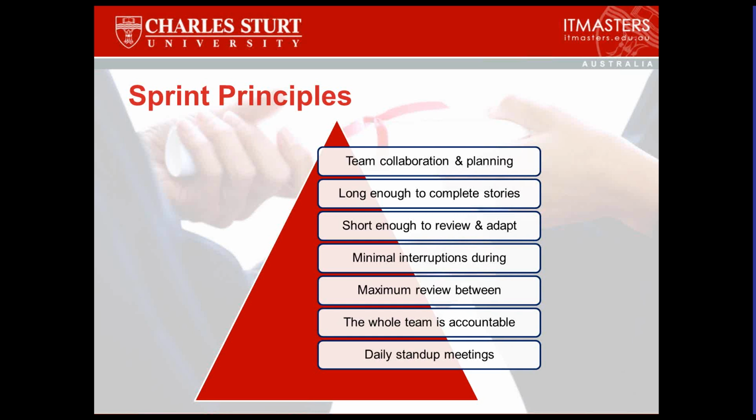But what that means is that the review that happens in between the sprints is full on. You maximize the amount of review that happens and the amount of leverage that you gain from it in between, because you do none of it at that level during the sprint. What you do during the sprint is only the daily stand-up meetings. And the daily stand-up meetings are there primarily to find the practical obstacles to getting on with what was committed to during that particular sprint.